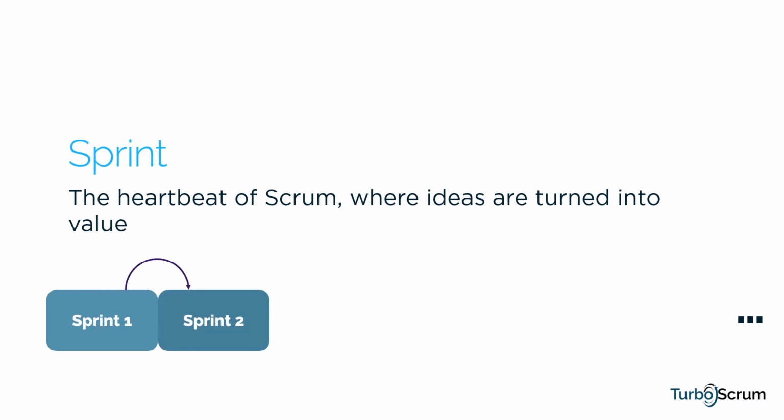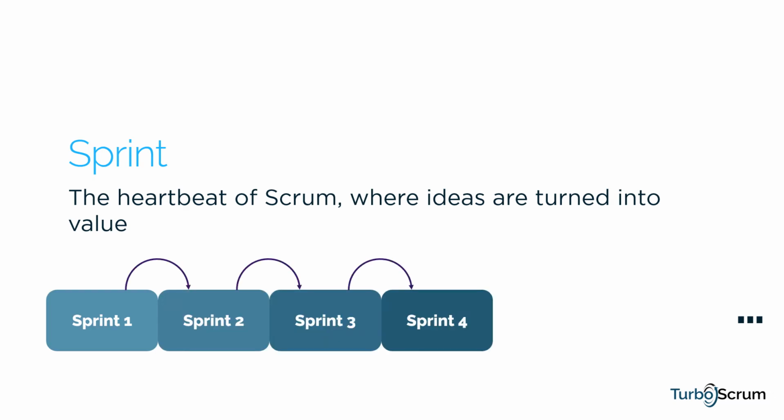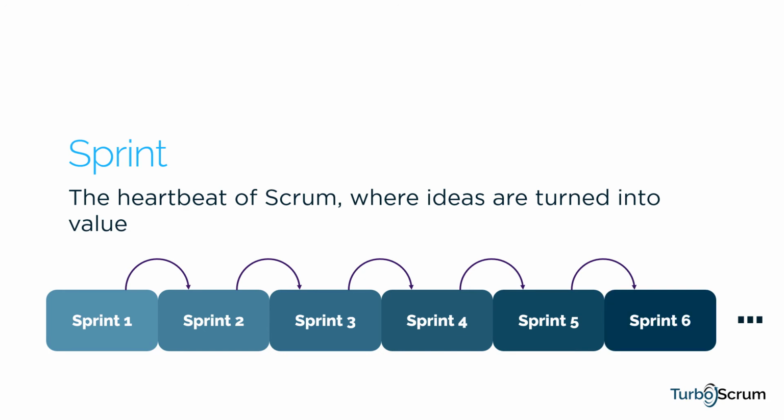Note that there's no gap between sprints. A new sprint starts immediately after the end of the prior sprint. Once we start sprinting, we're always within a sprint until the product is finished or cancelled.